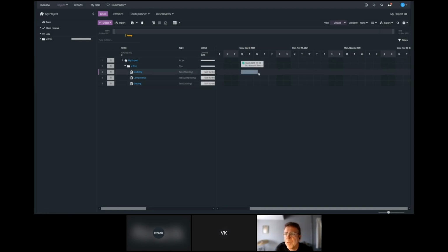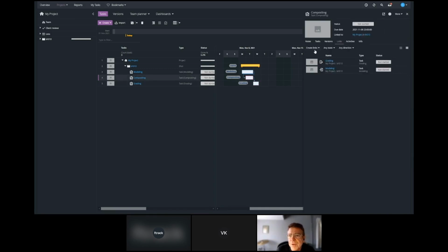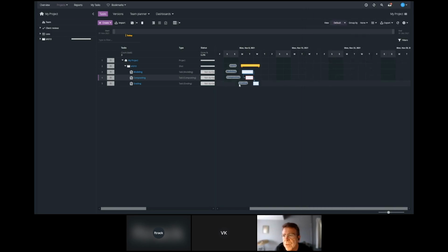We're going to enable match bid duration, and now, regardless of how big I paint the tasks in, their task duration is snapping to the value defined by the bid. I've also enabled auto link tasks, so this means that the tasks are linked to each other to create dependency. Here we can see the incoming and outgoing links on the currently selected task displayed in the sidebar. We can also see that in the Gantt with a blue line indicating the link.